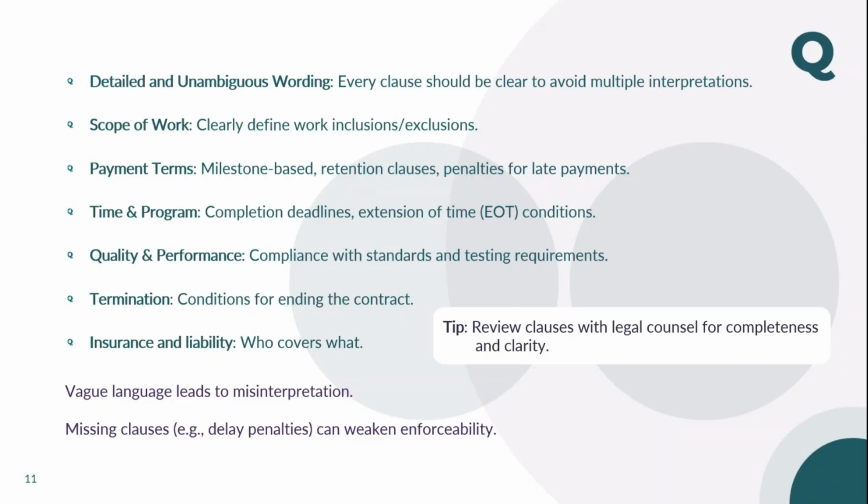So second, I usually split the contract into two types. The first, basically obligation part, I would say, like parties' obligation, payment, then quality control, time, everything in one section. Second is the worst part, adverse cases: termination, suspension, dispute resolution, insurances, all the safeguard mechanisms. So guys, at least these terms, these provisions should be there in the contract.